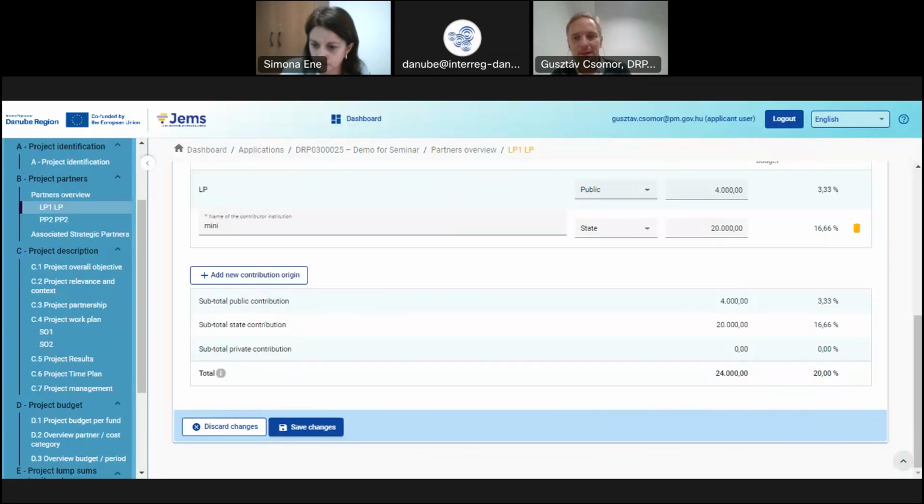And one other thing, it just came to my mind, but it can also be important. In the work plan, it's clear that you have to create specific objectives, but I forgot to mention that a maximum of 3 specific objectives are expected. So one main objective, obviously, and then within the work plan, define a maximum of 3 specific objectives.